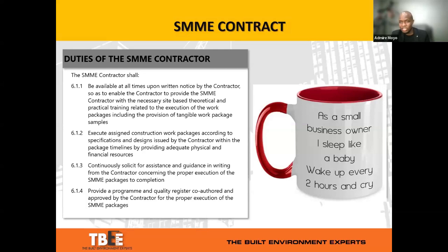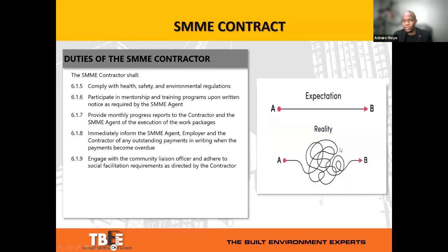So the cost of that essentially then is by mutual agreement between the contractor and the client based on the extent of the training that is required. But again, it goes to a point of recognizing the fact that SMMEs are imposed on contractors, and contractors are expected to ensure that they fulfill their basic obligations without the SMMEs necessarily knowing what they're supposed to do. So it gets to a point of engendering ownership and skills transfer in that respect, obviously with compensation in mind.